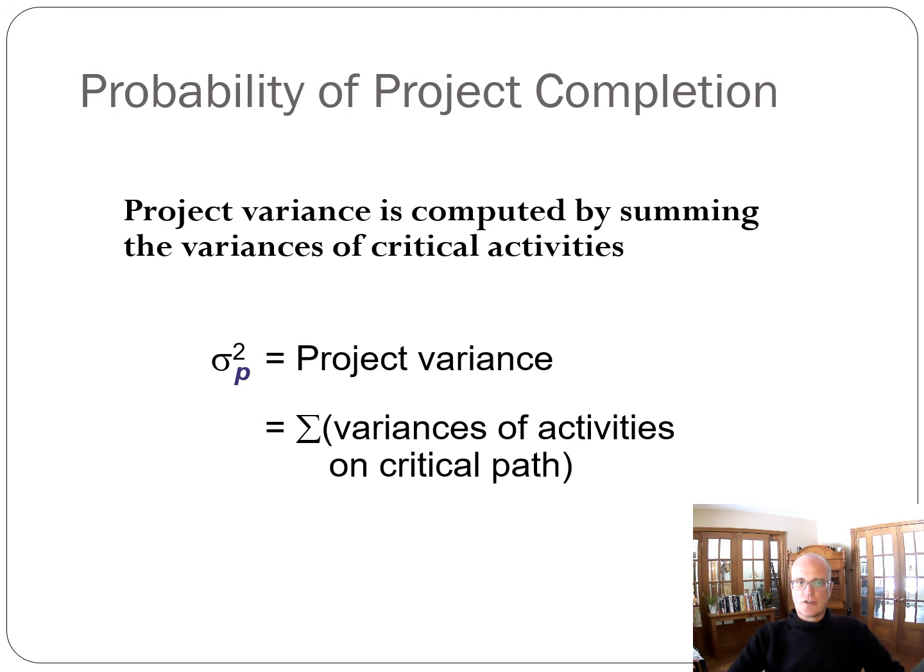And then determine the critical path. The project variance is computed by summing the variance of the critical activities. So summing the variances of the tasks or activities that are on the critical path. Again, this is relatively straightforward as long as you've drawn the project network effectively, you will be easily able to determine the project variance.